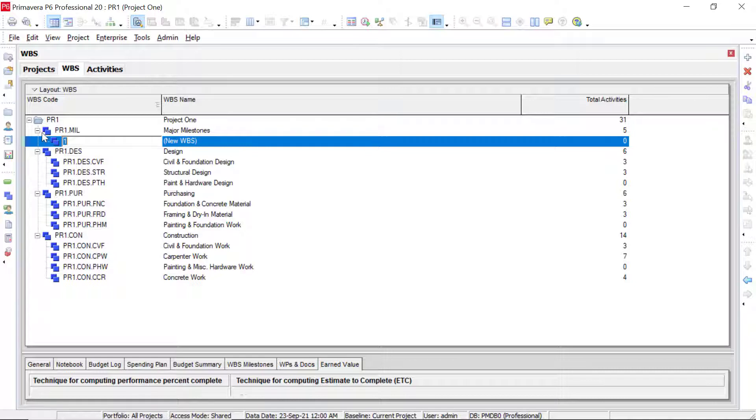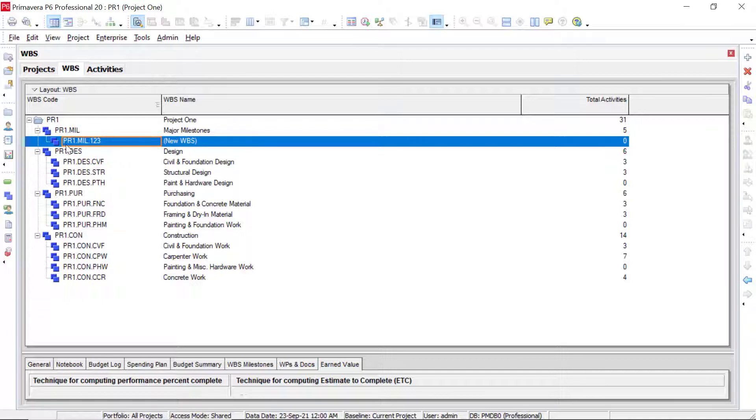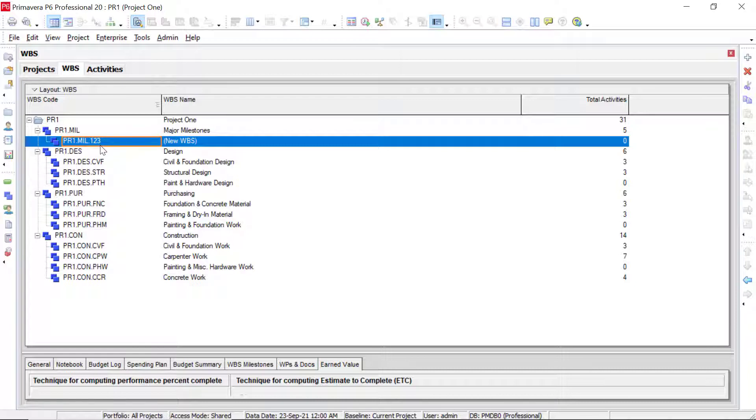This would be a third level WBS element that's added underneath our major milestones. We don't have to worry about typing in this code value right here. It's automatically going to copy that down. So let's just say we type in one, two, three, and enter. Then we see our code structure right here. We have our project one, we have our milestones, and then we have the one, two, three code that we just added in.